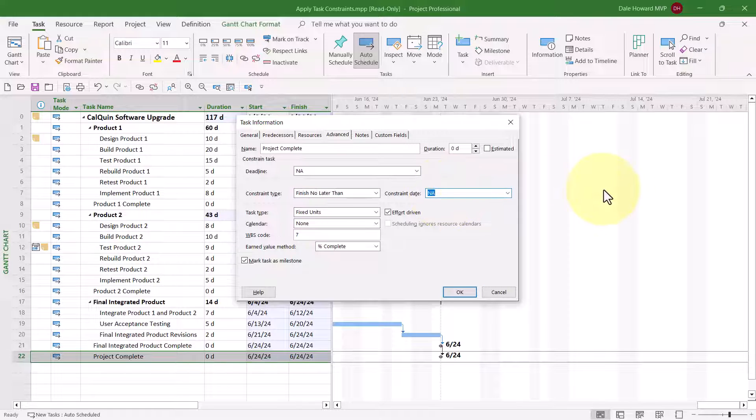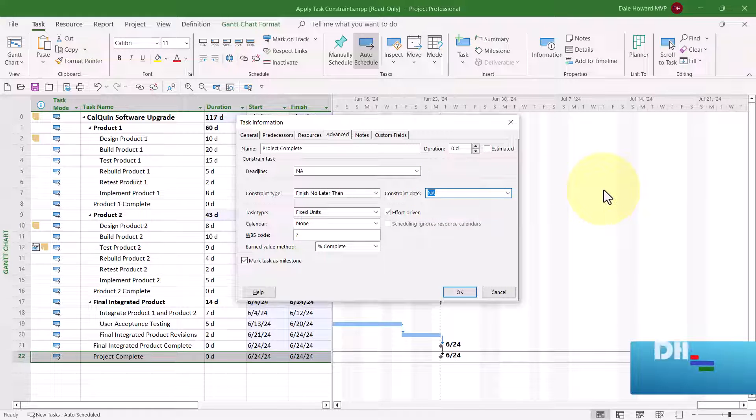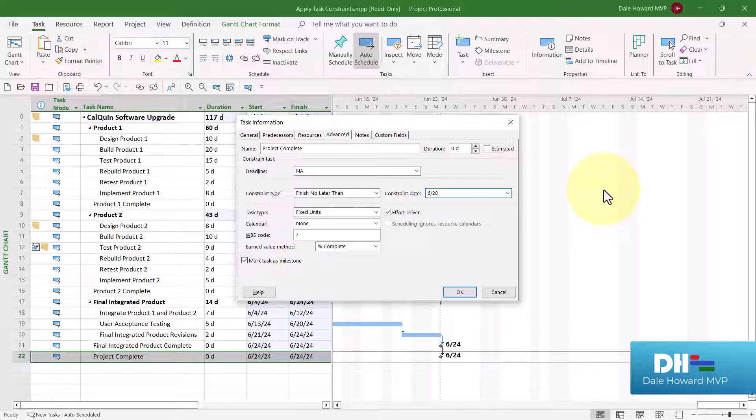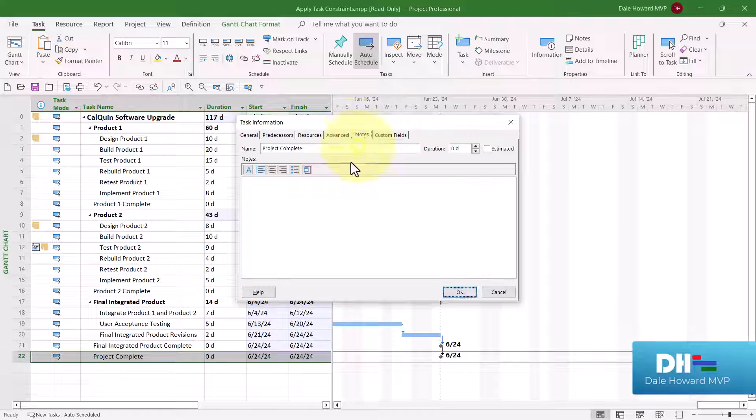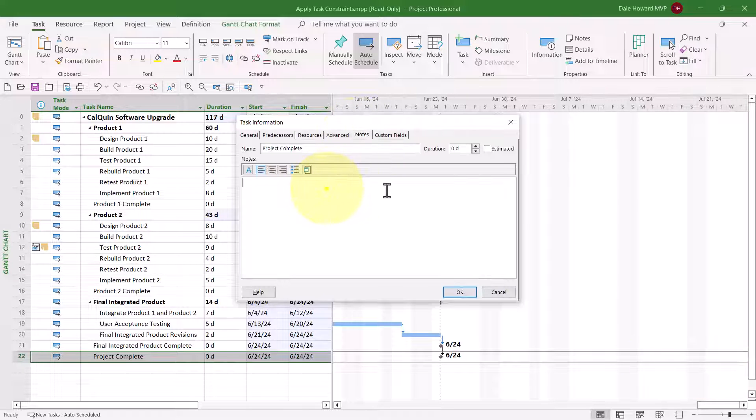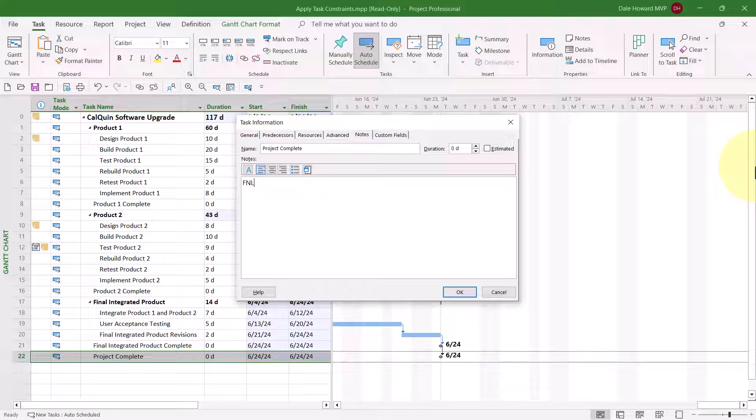And then in the Constraint Date field, enter the date of the constraint. In my case, this will be 6-28 of 2024. Then I'll go to the Notes tab, and this time I'll actually type it all out. Finish No Later Than. This will be 6-28 of 2024. And we will say that this is the contractual finish date for the project.